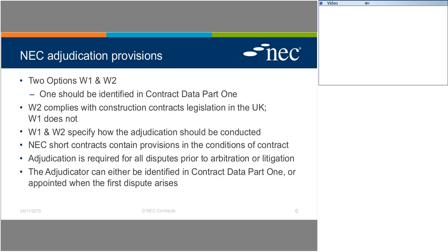But secondly, and probably more importantly, the adjudicator has to bring this process to a conclusion, potentially within 28 days of having it referred to him. If you refer a dispute to someone just as they're going on holiday for 3 weeks, they will be unable to act. So typically the parties try and either agree an appointment, or the referring party goes to an adjudicator nominating body, and at that stage you know what the dispute is and you know the timescales.